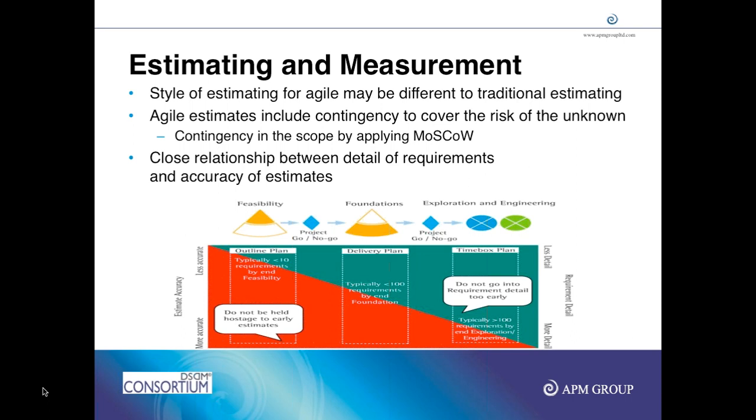And then after foundations, we submit to the stakeholders the delivery plan, the business case, and the overall solution. They again decide whether to go into exploration and engineering or not. If you have milestones within your exploration and engineering, you might have further go no go points based on risks or based on any decision making points.